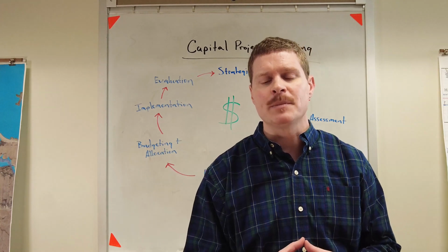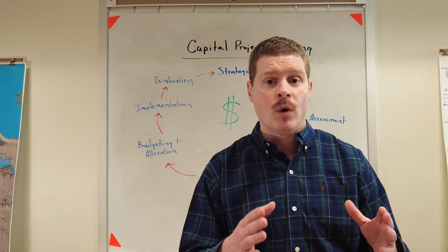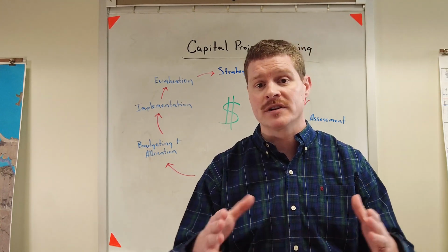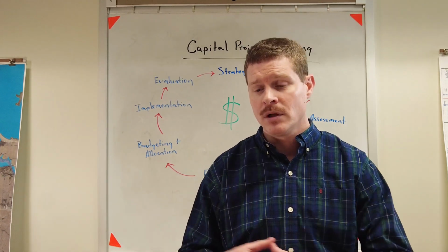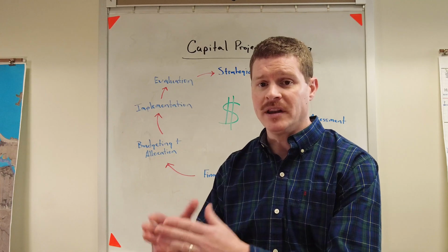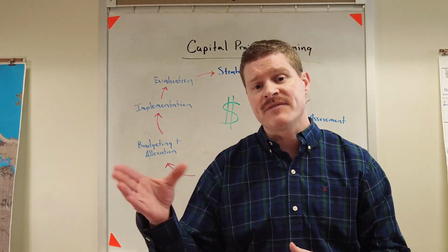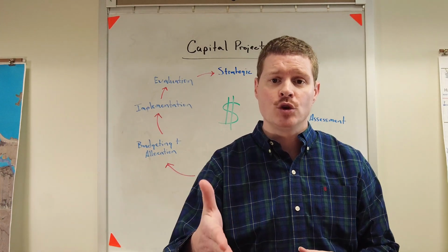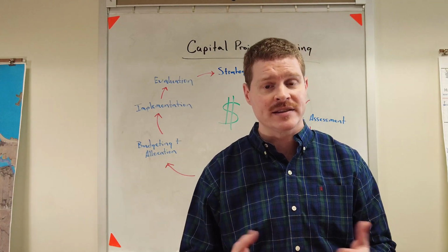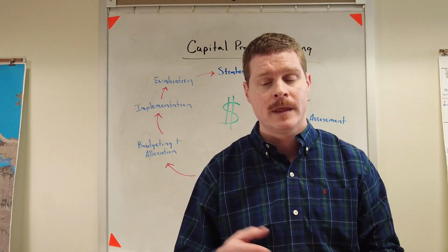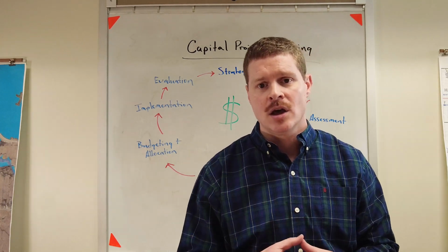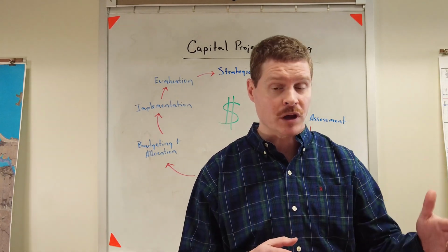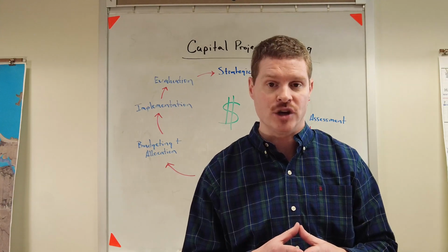Now, let's break this up a little bit more. One project might actually extend over several years. The first phase of the project, for example, the conceptual phase, might be done in year number 1. Once that phase is completed, we would then move to an engineering or design phase, which could be done in year number 2. Once that's completed, we would then transition to construction phase, which may actually extend over multiple years depending on the size and scope of the project.